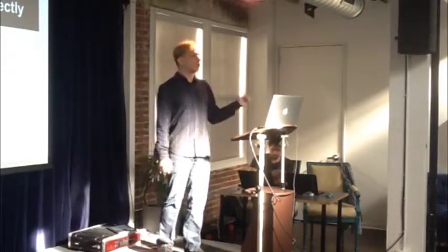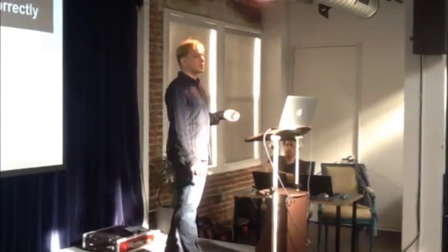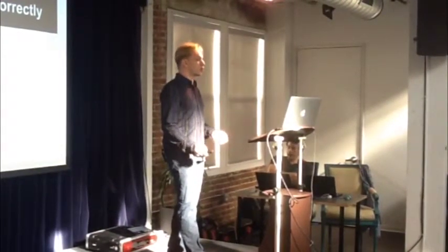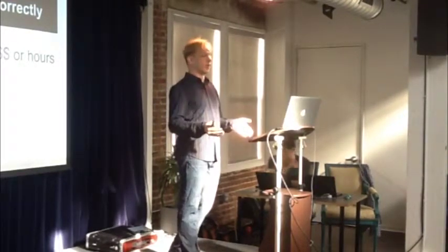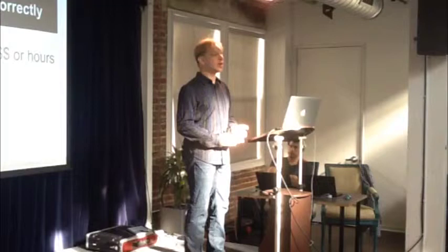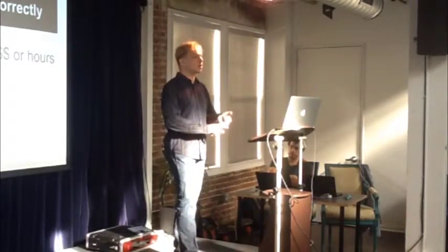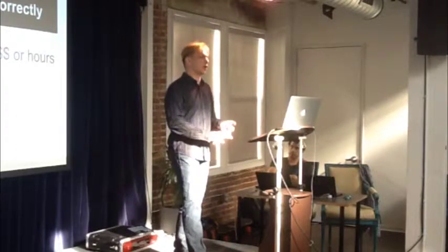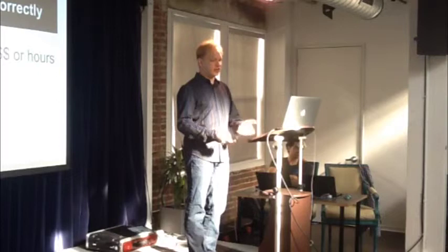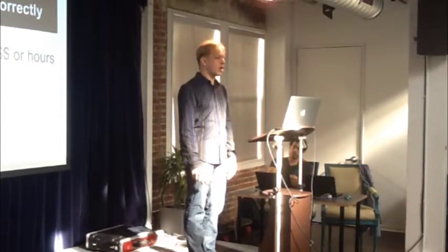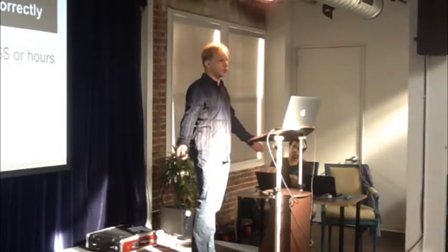Number 5, use a planning tool and use it correctly. One of the things that I think is most important in a software planning tool is that it gives you a way to estimate the complexity of tasks that is not in dollars and is not in hours. The reason is because we have very strong psychological associations with both those quantities, right? If a developer looks at a task and says, you know what, I can code that in 15 minutes, they're never going to tell you that that'll cost $650, because that would be absurd.